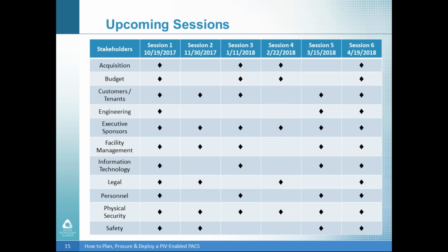That is establish the implementation and deployment schedule, develop the monitoring and the reporting plan so that you have some way to gauge the progress of the implementation, test the equipment, training, cutover that we heard discussed here a little bit earlier, and life cycle management processes, who is going to be doing this. And that will be session number 5.